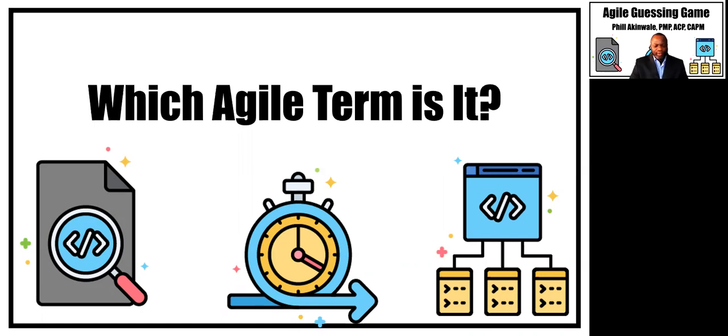All right, the 3 questions, as they are often referred to, follow a structure such as, what have you completed since our last stand-up meeting to move us towards the sprint goal?